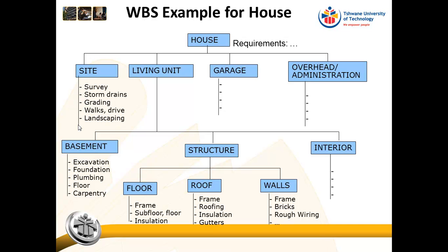So if I set up a work breakdown structure for your career day stall and you set up a work breakdown structure for your career day stall, they will look different. The only thing is, how do we know it's correct? It's correct if both of our work breakdown structures address all the work that needs to be done.